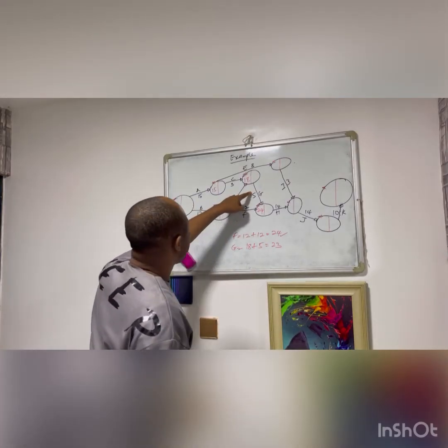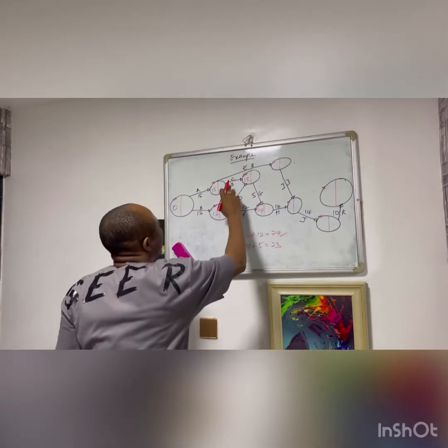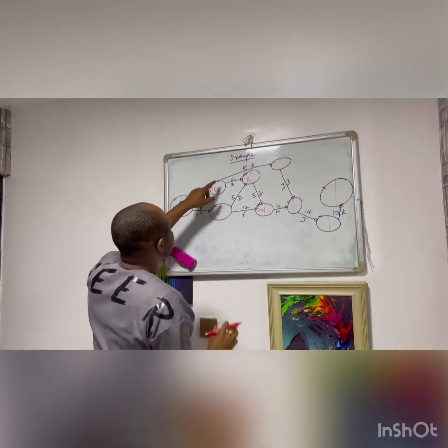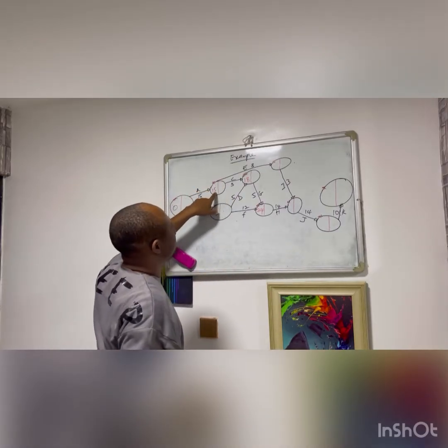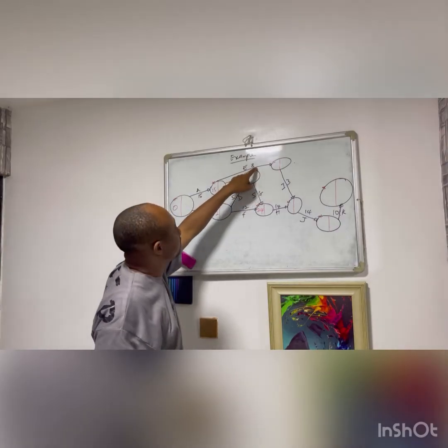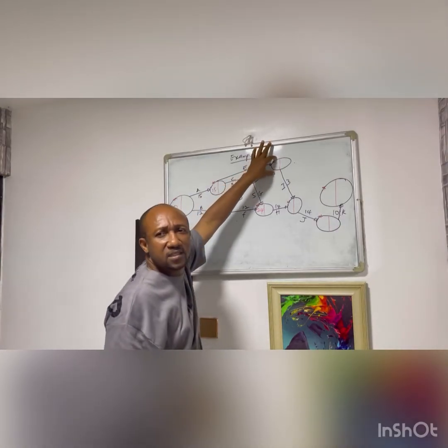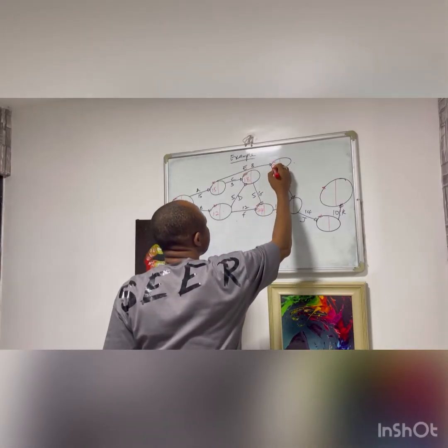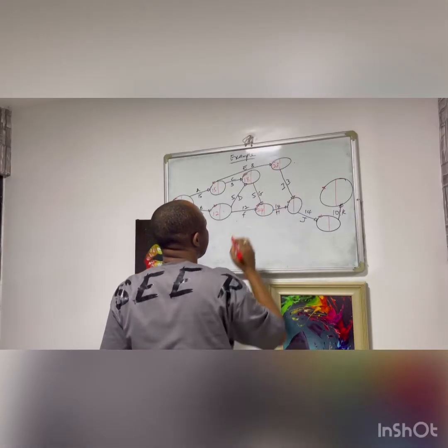So by the time I arrive here, activity E will take off in week 15 and use another 8 weeks. So it is only activity E that is arriving here. So I just add the two and have 23 here.